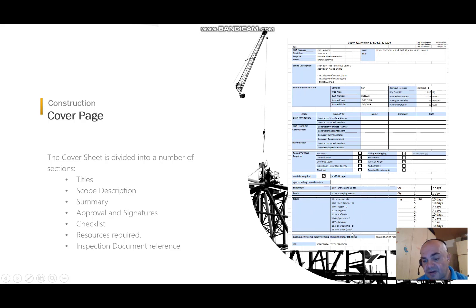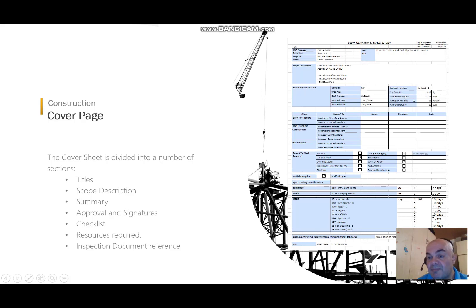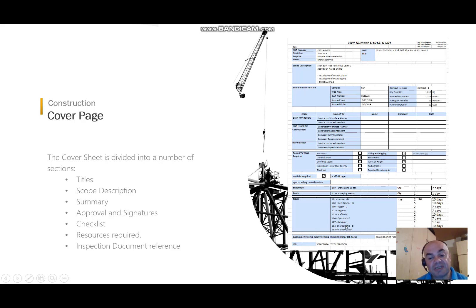I found it a good practice to add a 'D' after every resource that is direct, because those are the hours that will be cross-checked against the planned man-hours. For example, a flagman or a scaffolder are not considered direct resources in many projects, so you do not count them.